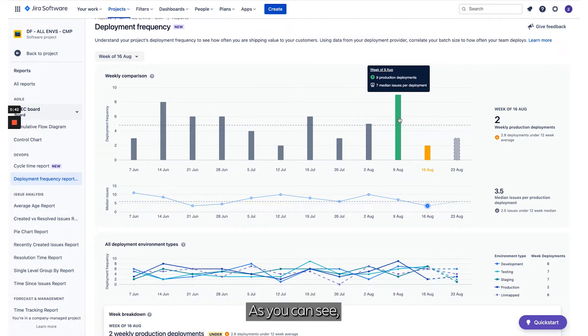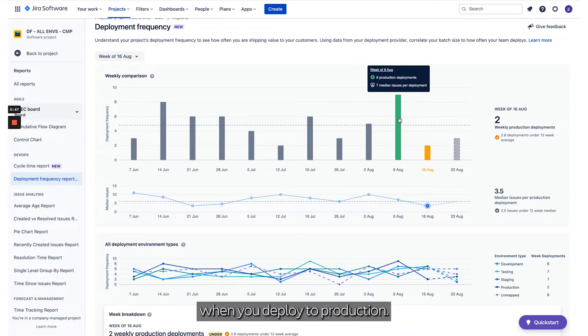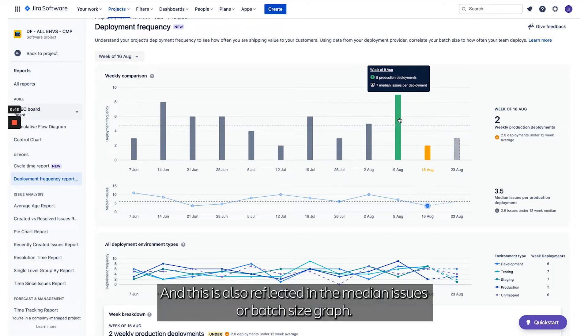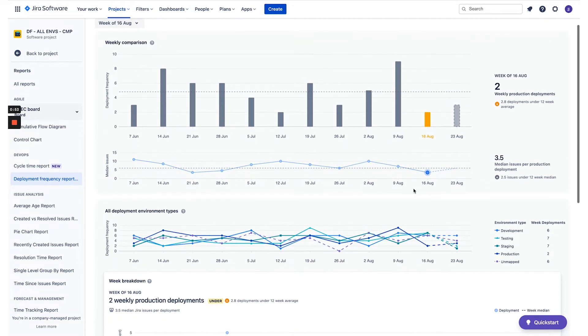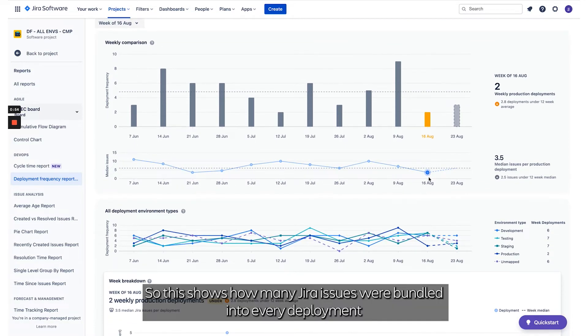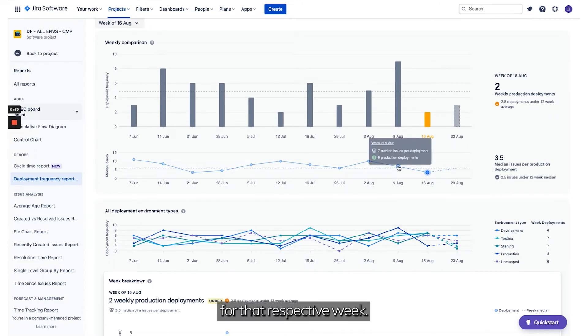As you can see, higher Deployment Frequency means a slightly lower risk of things going wrong when you deploy to production. This is also reflected in the Median Issues or Batch Size graph, which shows how many Jira issues were bundled into every deployment for that respective week.